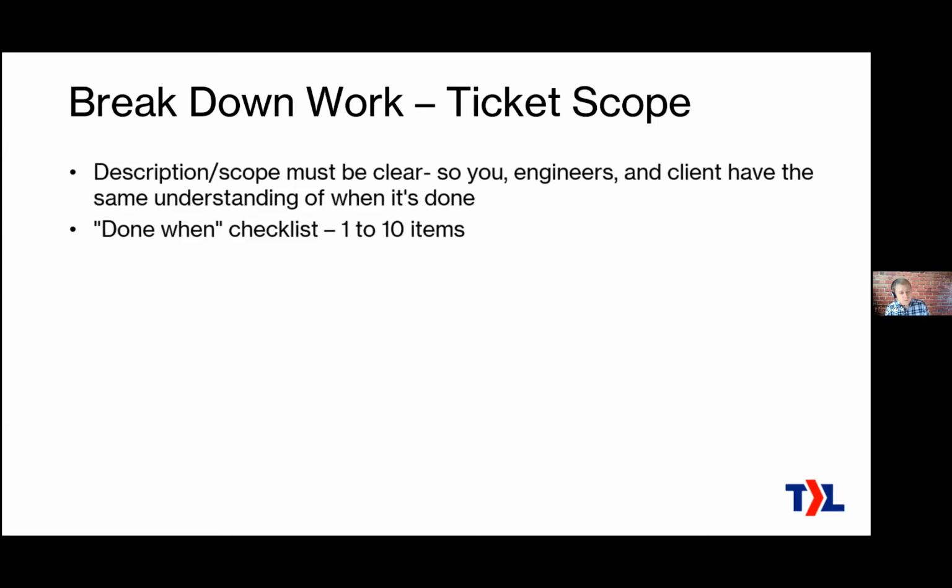So it's also acceptable if the checklist is not exact things to do, but more, hey, we need these 3 outcomes, and it's the engineer's job to figure out how to achieve that. That's fine too. Just know in advance which one you're doing. Is it more junior or is it more senior? Don't get that wrong, because you might end up giving outcomes to a junior engineer and they just spin their wheels because they don't have the foggiest idea how to even begin figuring out how to achieve those outcomes. So just make sure you use the right level for how you expect it to be done.